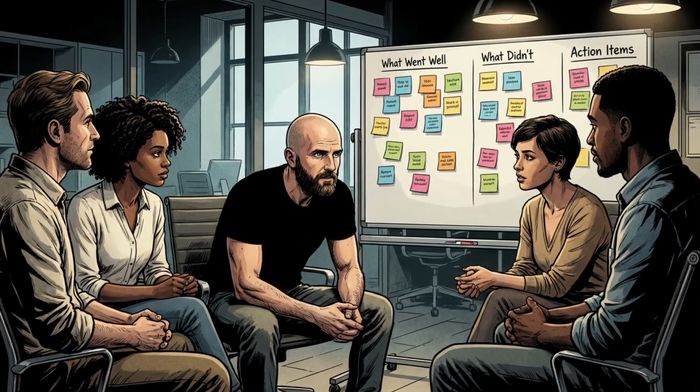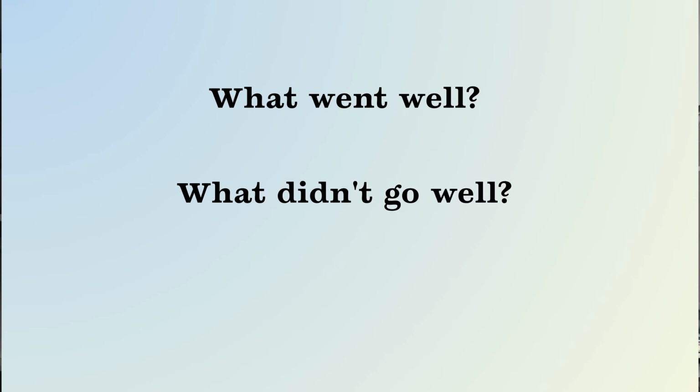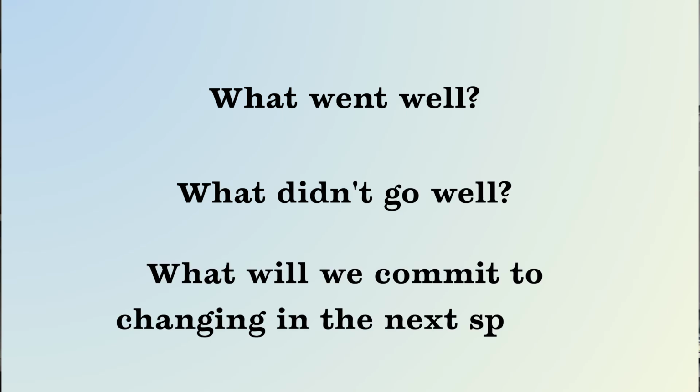But the most important part of closing a sprint isn't in the tool at all, it's the sprint retrospective meeting. This is where the team gets together and asks 3 simple but powerful questions. What went well, what didn't go well, and what will we commit to changing in the next sprint.